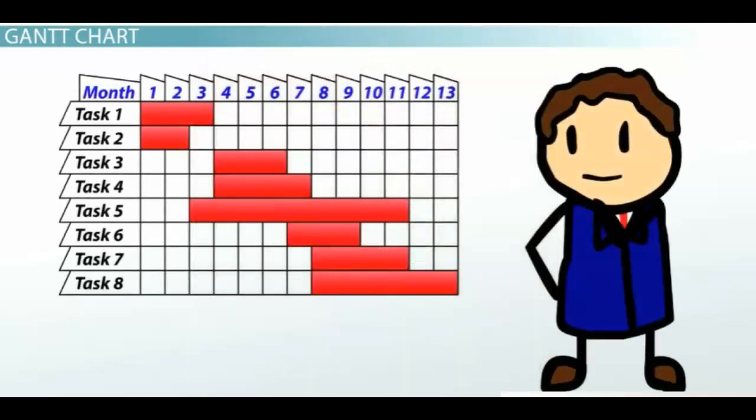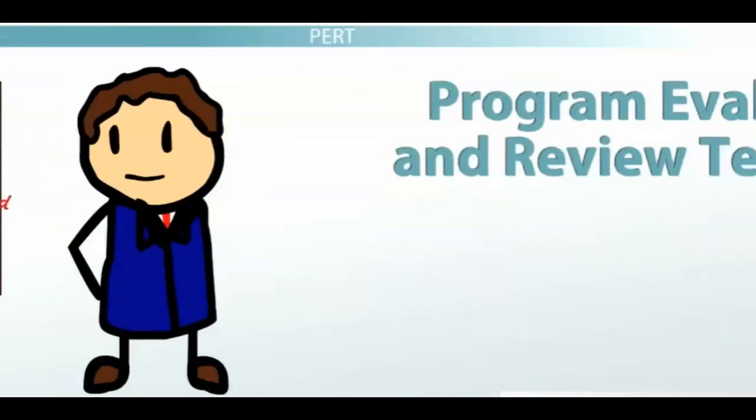This tool is used to plan future project activities, but also to keep track of progress. It is common to develop a Gantt chart for the entire project in advance and then update the chart as different project activities get underway and completed. This makes it possible to see which activities are on track and which ones are not.